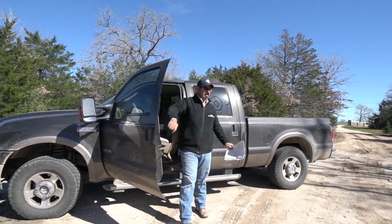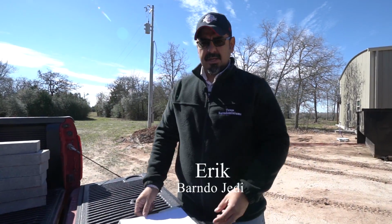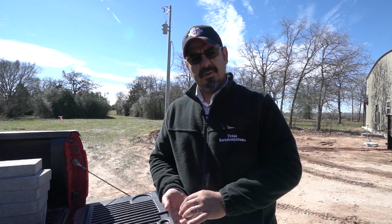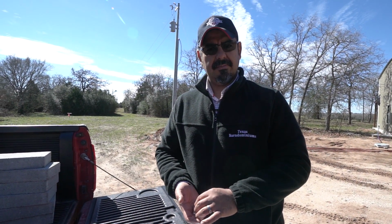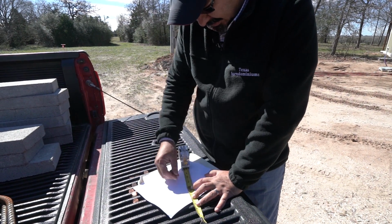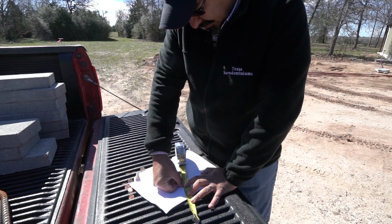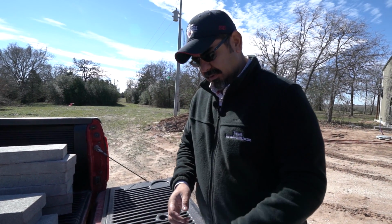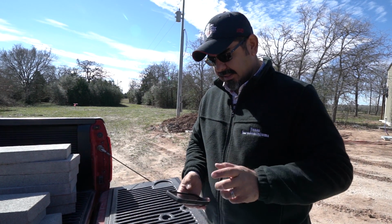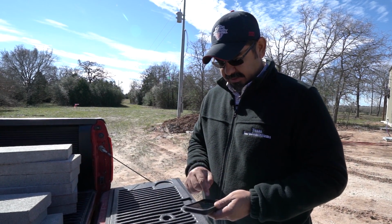All right, let's do this. Let's figure out how many pennies we're gonna need. The customer wants to put pennies on the hallway, and she's gonna do $100 worth of pennies. We don't know how much that's gonna cover, so we're gonna do the math. Every penny is 3/4 of an inch. She's gonna get $100 worth. That's 10,000 pennies, 100 times 100.